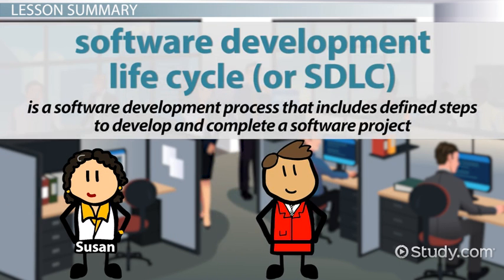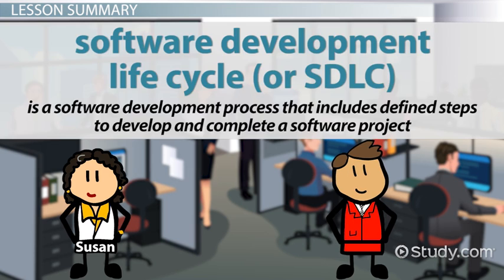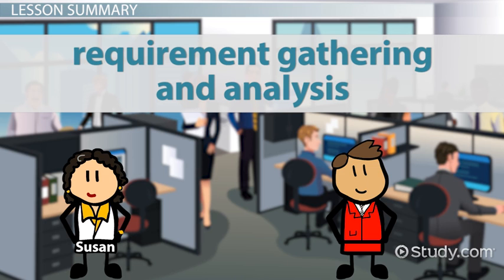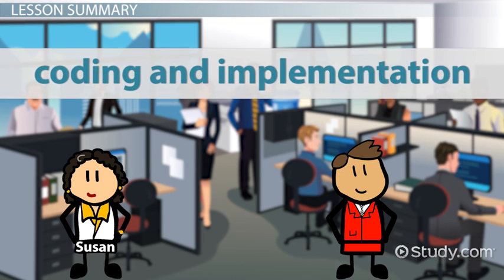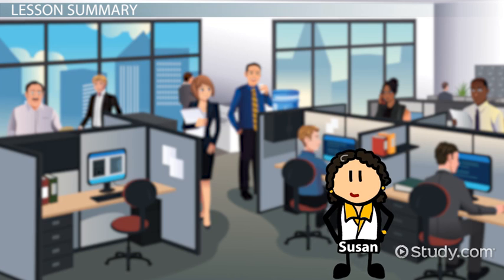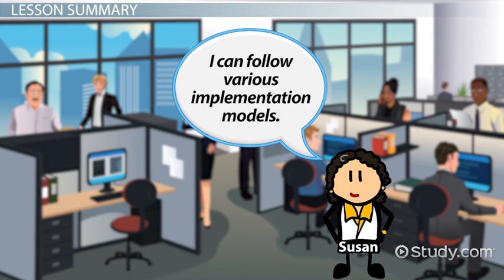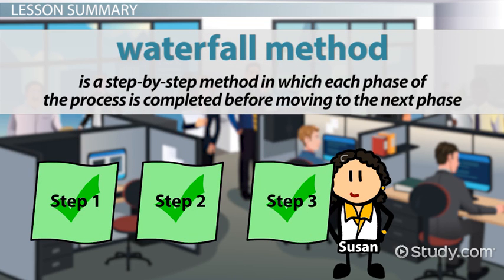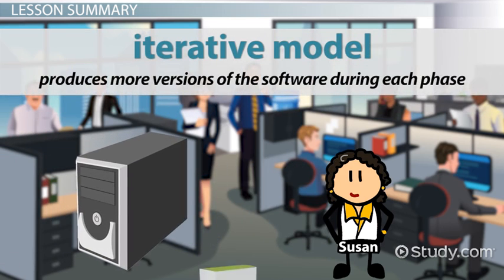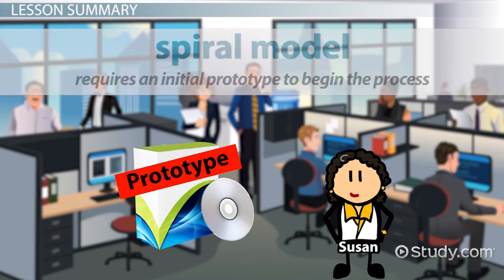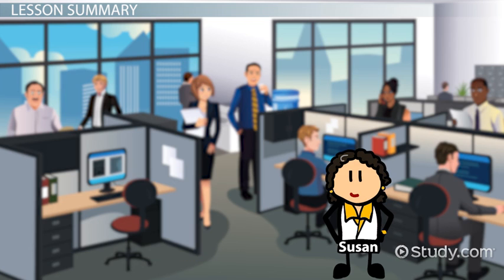The Software Development Lifecycle, or SDLC, is a software development process that includes defined steps to develop and complete a software project. The SDLC is the blueprint for the entire project, and it includes six common stages: requirement gathering and analysis, software design, coding and implementation, testing, deployment, and maintenance. A project manager can implement an SDLC process by following various models, including the Waterfall model, Iterative model, and the Spiral model. The Waterfall model is a step-by-step method in which each phase is completed before moving to the next. The Iterative model produces more versions of the software during each phase, and the Spiral model requires an initial prototype to begin the process. The project manager decides which model is used based on customer specifications.